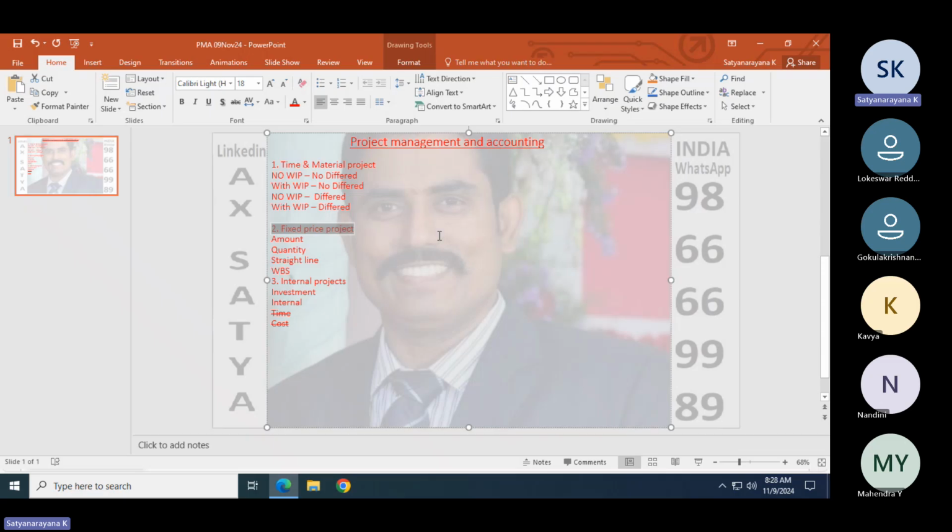So that is a fixed price project. Here, how much cement is used, how much sand, how much iron, and how many labor they need to use, we don't know. That will be maintained by the construction company. We have just agreed with the contractor on 45 lakhs total.